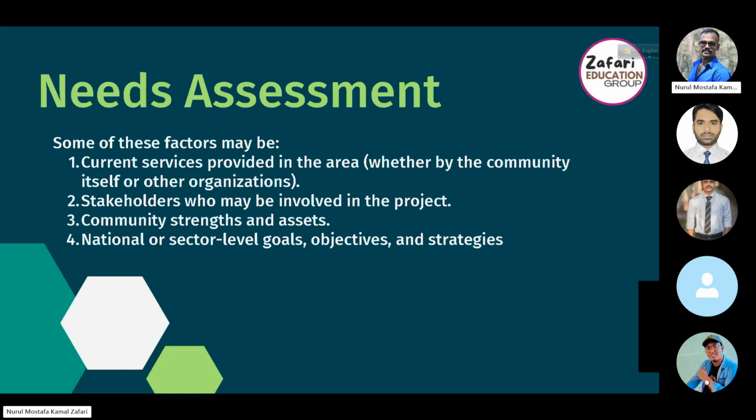A needs assessment covers the current services provided in the community, the available services, and also what the gaps are in terms of services and what is needed in the community, who the stakeholders of the project are, the existing community strengths and the assets available in the community, and also how the project or the needs of the people will align with sectoral goals or objectives or strategies at the national or local level.